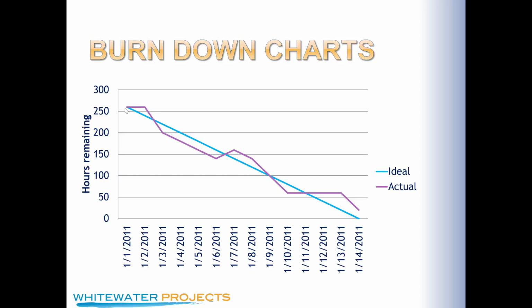So you scratch out the existing 8 and you write a new 8 in, which is what I would do. You want to track that. You want to see that. If you're doing a physical card, you'd actually line through the first 8, draw a new 8. That way you're actually saying, I worked on it, but I still have 8 hours left.